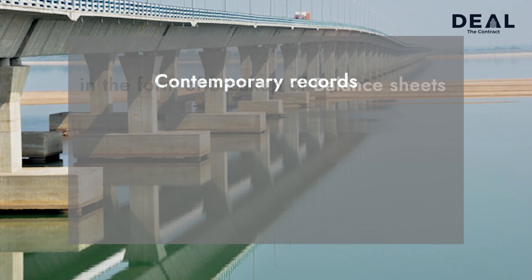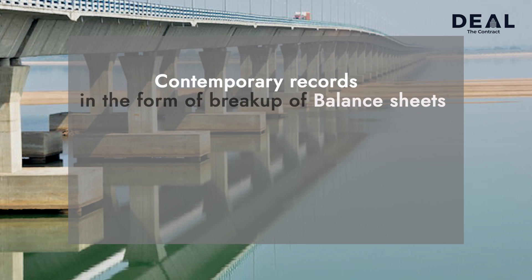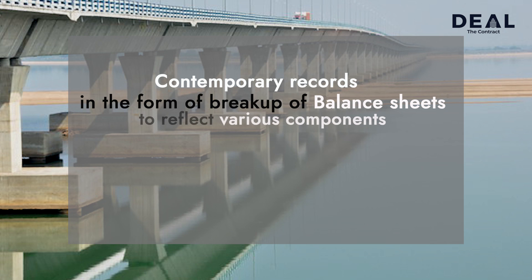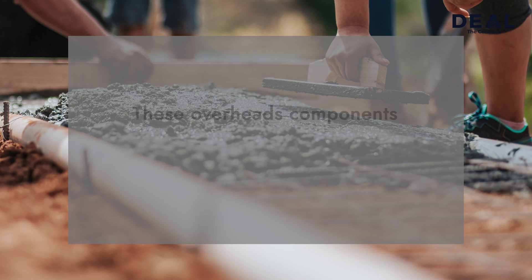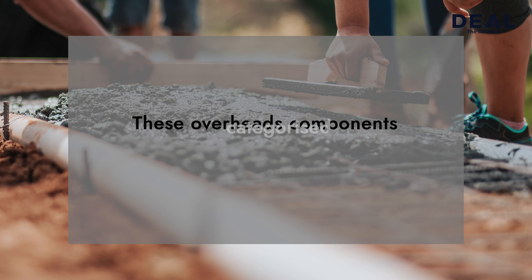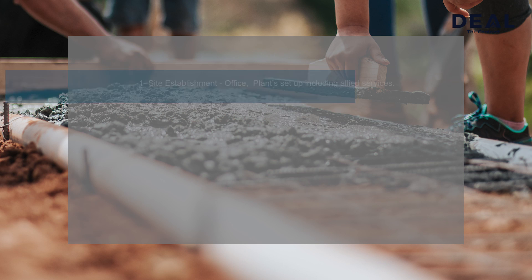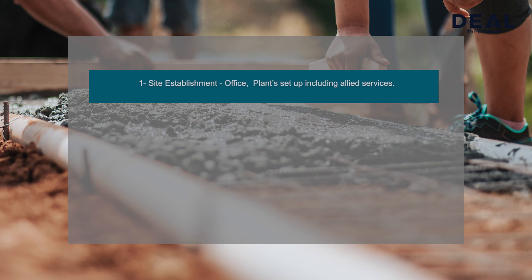Contemporary records in the form of break-up or balance sheets to reflect various components of overheads are a must. These overhead components can be categorized as: 1. Site establishment, office, plant setup including allied services.